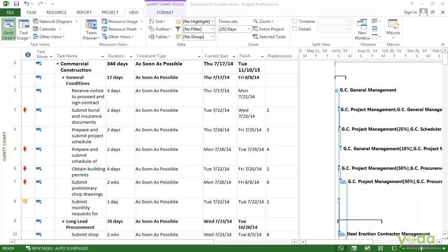When you build your task list, a single Gantt chart view might be the best. But most of the time you want to see the entire project as well as the specific details for a task, resource or assignment. The details pane displays a second view in the bottom half of the project window, so you can see the details about the tasks or resources you select in the top pane.